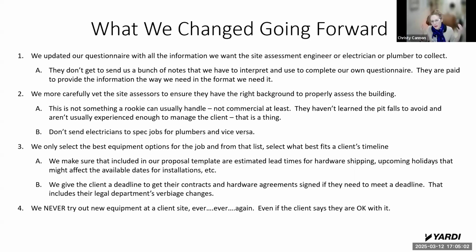You know, you go to a site and you can't find the submeter, and that's because it's up under the drop ceiling. Or you go to a place that's like a mall with restaurants and retail and whatnot, and that submeter's up above the prep center for a restaurant. Well, you can't do that assessment until after they close or before they open. So little things like that you think are not a big deal, but they add up to a lot of project delays and costs.